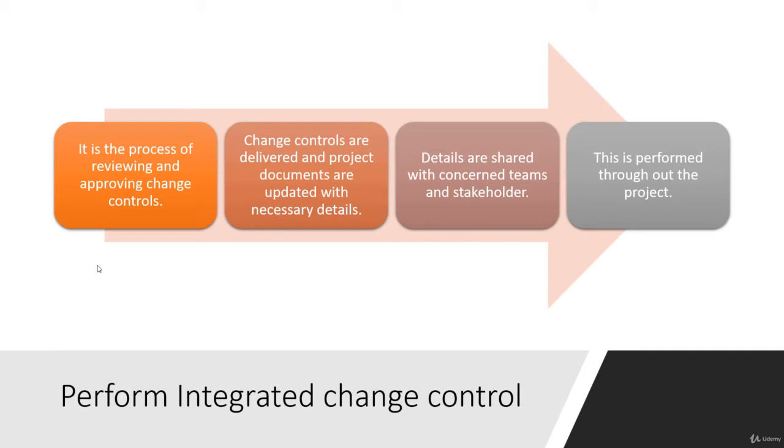And change here, as I said earlier, refers to a change in the existing requirements, documents, code, or any other setup in the project. And yes, even if your stakeholder is asking you verbally, let's say you are walking through the document or you are in some meeting where your stakeholder is verbally asking you to make the change, you are responsible for documenting that. So if you are a project manager or a business analyst, anybody, if you receive a change through any medium, you have to document that.